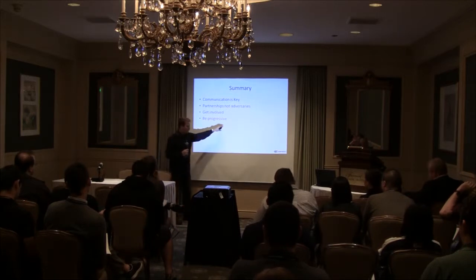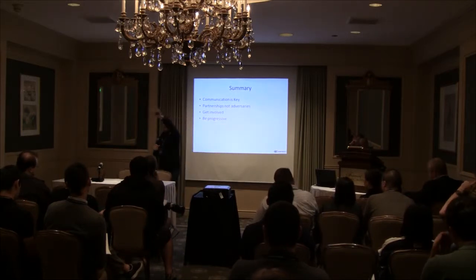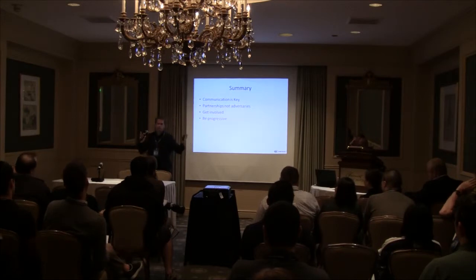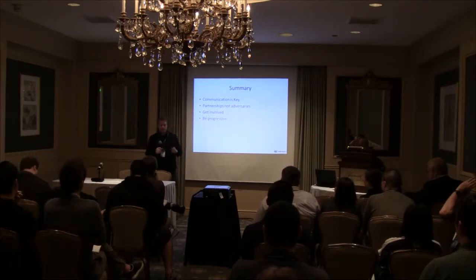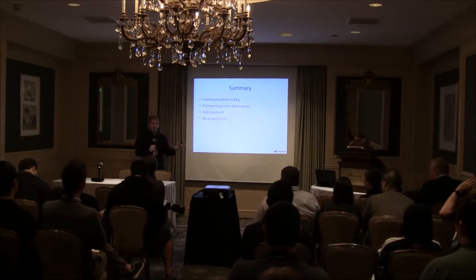Don't get to a process and say, that's it. We've reached this panacea. We've reached where we're going to be. Always be looking for what the next efficiency you can get out of your process is. Don't make a process change every single sprint. Don't make two of them. Make one of them, maybe once a release, once every two or three sprints maybe.